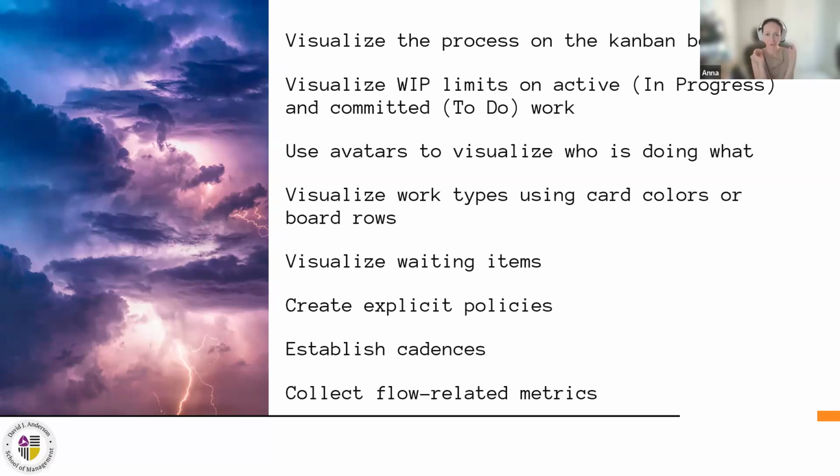start with this big fat in progress. Okay, so we'll have backlog, then analysis in progress or requirements in progress, whatever you decide to call it, or discussion with client in progress, up to you. And then next to do, next for delivery, and then is your commitment, your work starts.